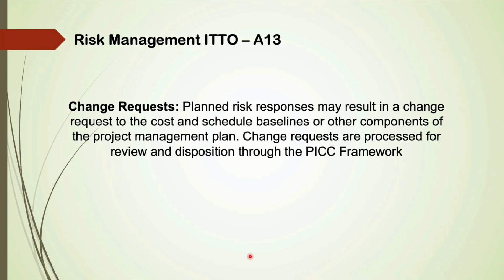Answer: change requests. Planned risk responses may result in a change request to the cost and the schedule baseline or other components of the project management plan. Change requests are processed for review and disposition through the Perform Integrated Change Control framework.